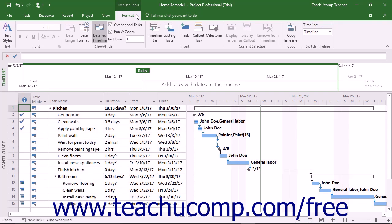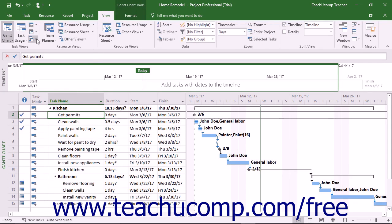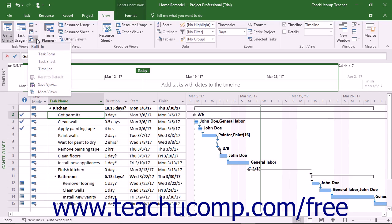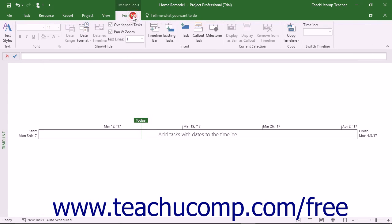Alternately, to show only the timeline view of a project file, click into the tasks in the Gantt chart view, and then select Timeline from the Other Views drop-down button that appears in the Task Views button group on the View tab in the ribbon. You can then easily see the Format tab of the Timeline tool's contextual tab appear within the ribbon, and use the buttons within this contextual tab to manage the timeline view of a project file.